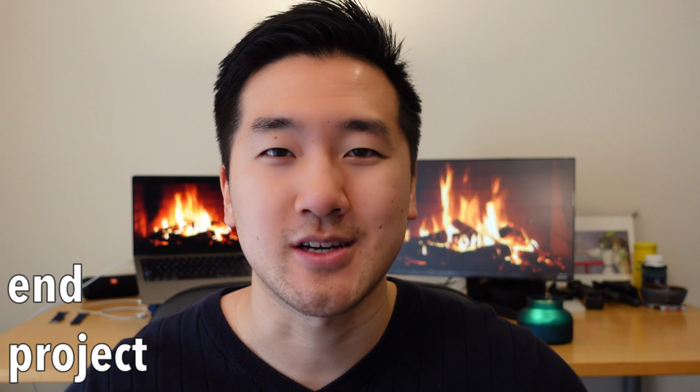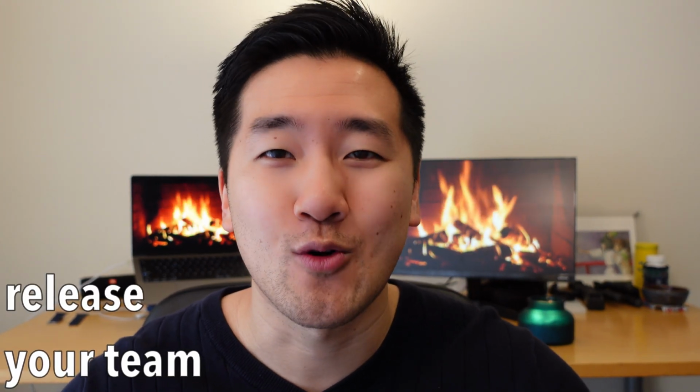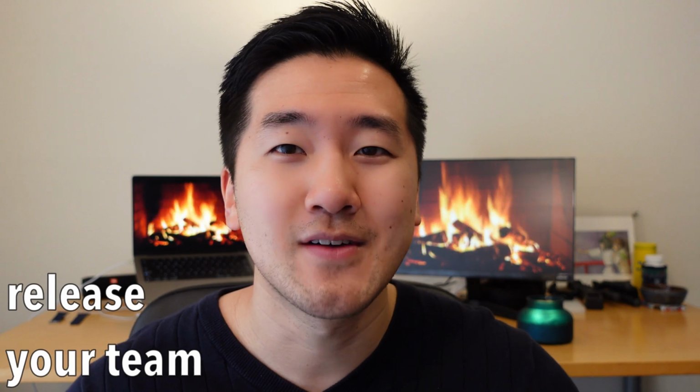Okay, and last but not least, you finally have the formal closing of the project. There are a couple of steps and components to this one, but they're all really quick ones. The first of which is end the project. Project's done, you've completed all the deliverables, there's no longer a need for you and your team. With that being said, release your team members. They're all free to work on whatever other assignments they have. You should no longer be holding them accountable to this project.